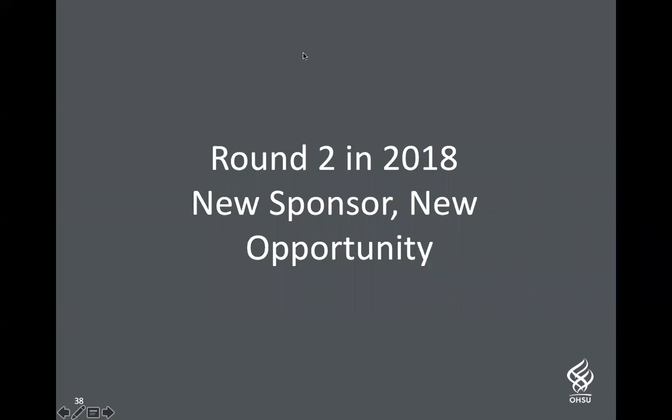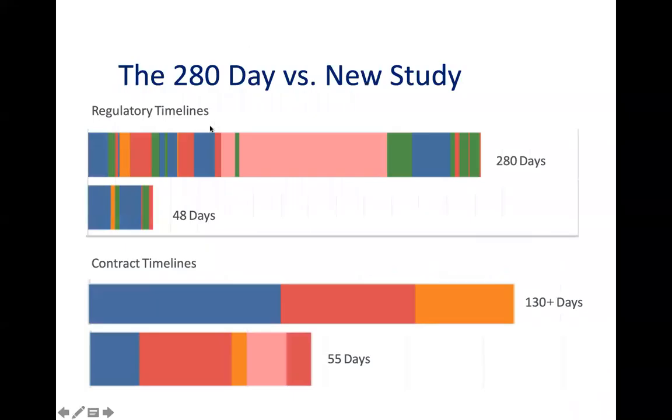So in 2018, we were contacted by a new sponsor with a new EFS trial, and we decided to put our learnings to practice and see if we could make it through. What we found with the things that we had put in place, we were able to shrink our regulatory timelines from that 280 days to 48 days, and our contract was negotiated within 55 days.